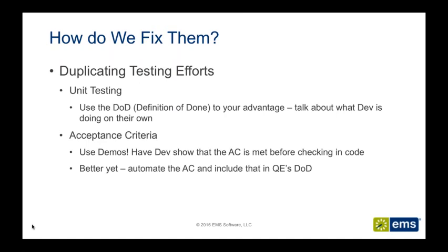So when we talked about the earlier question of how do we ensure that dev, even though they might not like to test, do test, one thing that we've done is this acceptance criteria piece. At the kickoff, we knew that a lot of QE's time was spent simply walking through the acceptance criteria once dev handed that code over to us. It's a very meaningful test, but maybe it wasn't something that was solely the responsibility of the QE to do, because we were finding more and more individual devs had already been doing that as part of their own definition of done.